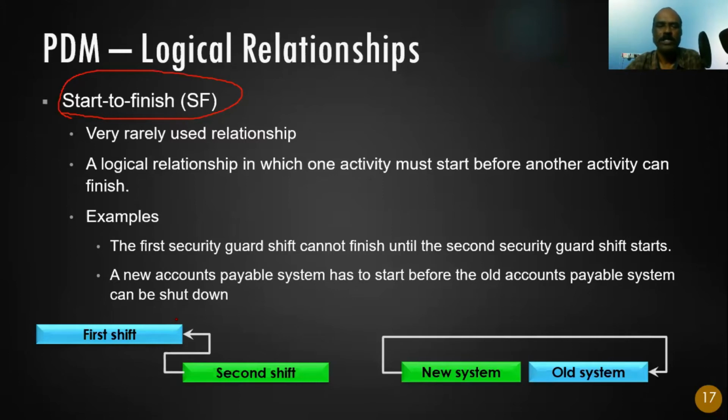Okay. You understand what is happening here? This is not finish to start. Typically, we want finish to start, but sometimes it's start to finish. Unless the second shift starts, the first shift cannot stop.